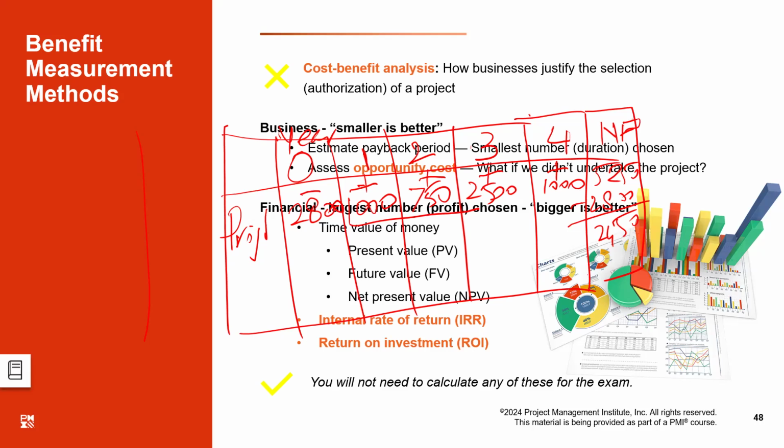You have invested $2,800 on this project. You agree with me that you will be able to recover it according to this schedule in the third year, right? So yes, it's almost 2.33 years. So 2.33 years is my payback period, because after that whatever money is coming to me is profit. Why I am more worried about is when I can be breaking even.